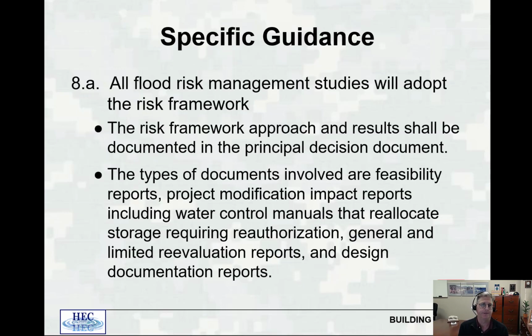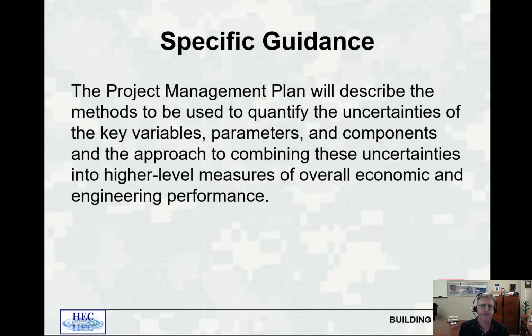So, some specific guidance. All flood risk management studies will adopt the risk framework. And if you remember from the last presentation, that means risk assessment, risk management, and risk communication. The risk framework approach and results should be documented in the principal decision document. Ultimately, that would be the chief's report. The types of documents involved are all the things that we talked about in the previous presentation: feasibility reports, project modification reports, and so on and so forth down the line. So again, pretty much anything you're working on will require a risk assessment.